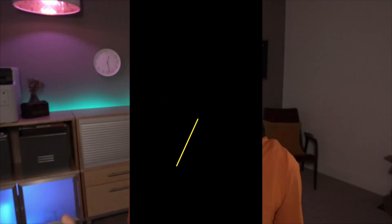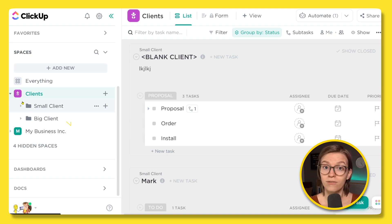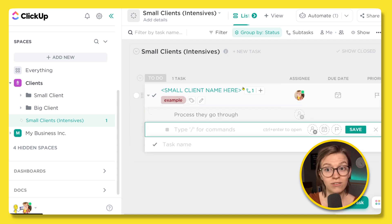The second mistake is too much consistency — which sounds like a good thing, but most of the deadliest mistakes do. What I mean is you are trying to treat everything in your ClickUp, every process you have, the same. The fact is your processes, clients, and tasks are not equally important, equally complex, nor equally top of mind. If you have multiple services, do not structure all of them the exact same way. For example, big tenure clients should sit higher in the hierarchy than strategy sessions — a large web design build out at a folder level, but a quick website audit at the task level.